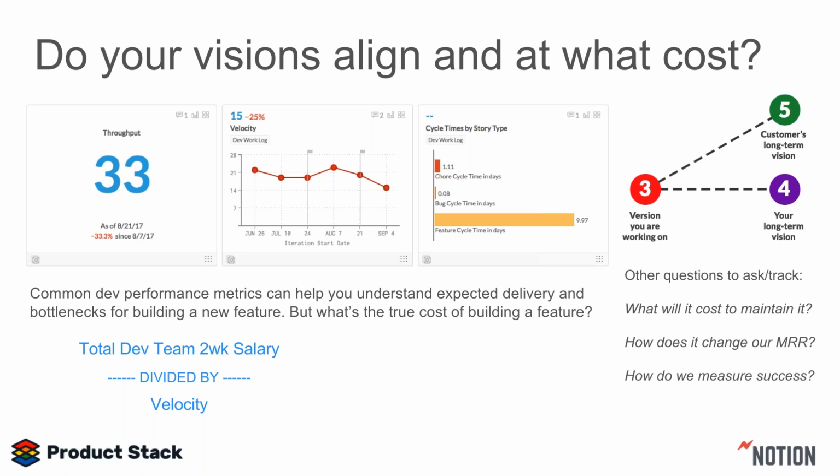Another way of looking at that is the blue formula I have down the bottom there: what's the true cost of building? Physically, what does it cost in dollars? One way to do that is to take your total dev team salary and divide it by your velocity. So if you're tracking your velocity every 2 weeks, then you want their 2 week salary. What that results in is a physical dollar amount of cost per point, right?